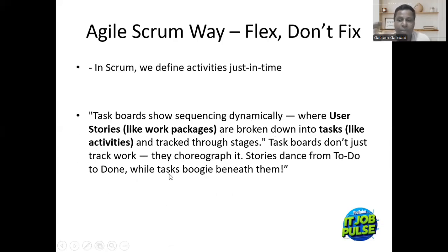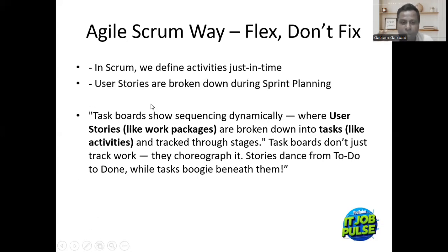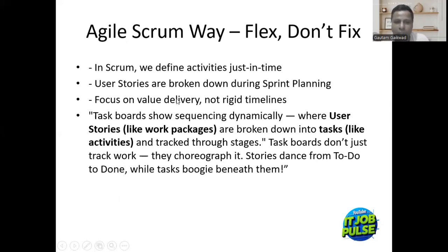In Scrum, we define activities just in time, right? So it is like we will figure it out on the way. User stories are broken down during sprint planning into the tasks, which we just discussed. Focus on value delivery, not rigid timelines. Okay.